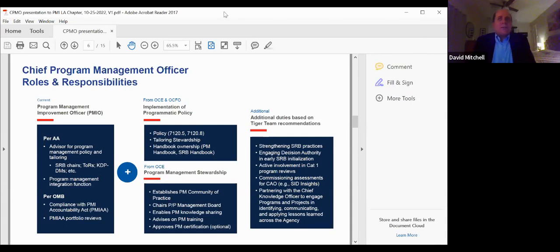Yeah, I guess the way I would answer that is, we've certainly had plenty of impacts due to weather through the years, and I'll give a quick example. Again, I keep going back to James Webb Space Telescope, but the way to deal with that is you need to plan up front for the known unknowns or unknown unknowns by adding schedule and cost reserves. That's critical. But with the James Webb Space Telescope, they did work at Goddard where they got hammered with a snowstorm in the Washington D.C. area that really impacted them.